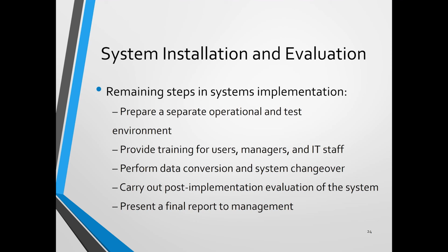will start from the 2nd of January 2021, so that means right now we have around 1.5 months left. If the legacy system we used before was used since 2010, that means it's 10 years ago, so the historical data from 2010 until now, you can start collecting or converting maybe since the last 6 months.